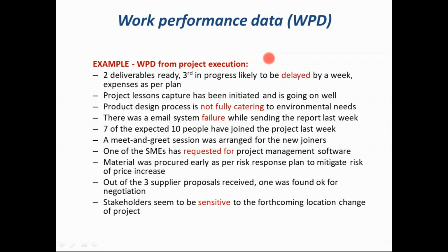What is the delay? And you can ask them, okay, there is a delay, but when do you think we can deliver it? So it's a forecast. It was supposed to be delivered tomorrow, but since you're saying it's delayed, when do you deliver it? They will say, sorry, not tomorrow, but day after tomorrow. So it's a forecast. So analysis, deep analysis, root cause analysis, trend analysis, earned value analysis, whatever, and then forecasting. When you do this, it becomes information.